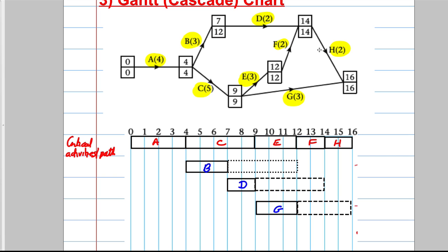But also it tells us something about what some of the things that must happen first. So C happens after A, E happens after C, etc. Is there anything else that we need in here? D obviously has to happen after B.